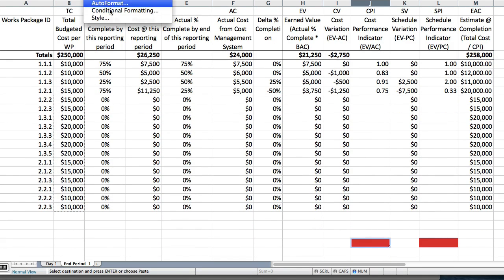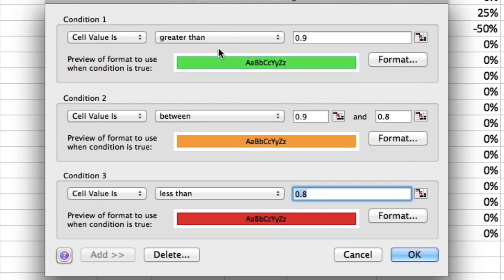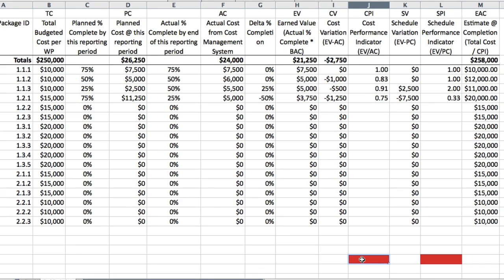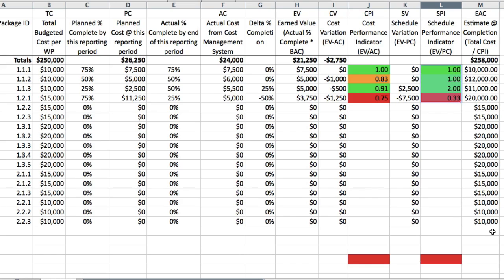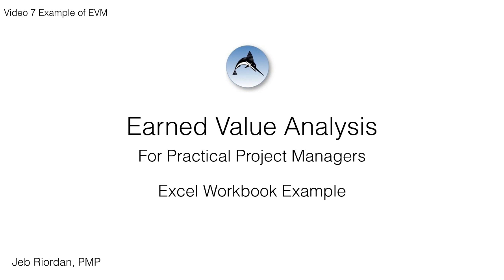Let's add traffic lights using conditional formatting. Our tolerance levels for both CPI and SPI are: above 0.9 — all OK; between 0.8 and 0.9 — OK but let's try to improve; below 0.8 — drastic action necessary to correct the situation. Format one cell and paint that format down the columns. So there you have it: basic earned value management. We can add some Excel magic to make completing the spreadsheet easier and more automatic, and improve accuracy by including past performance of production teams. I'll leave that to you — maybe share your results in the course discussion area, and I'll see you in the next lecture.